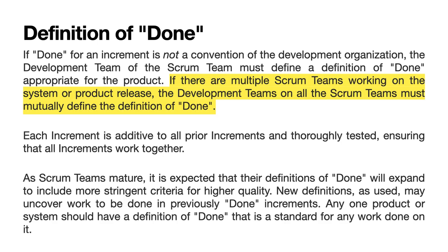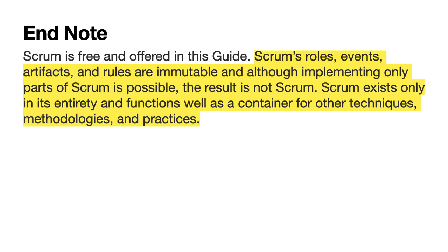Each increment is additive to all prior increments and thoroughly tested, ensuring that all increments work together. As Scrum teams mature, it is expected that their definitions of done will expand to include more stringent criteria for higher quality. New definitions, as used, may uncover work to be done in previously done increments. Any one product or system should have a definition of done that is a standard for any work done on it. Endnote. Scrum is free and offered in this guide.